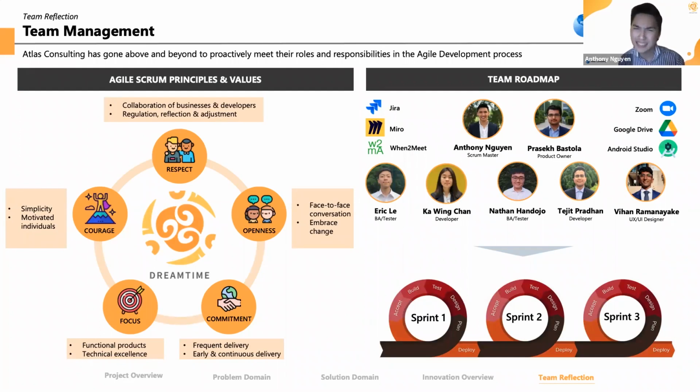During Sprint 1, our team failed to adhere to Scrum practices and often overcommitted to deliverables, leading to scope creep. In response, our Scrum Master and Product Owner demonstrated strong initiative and leadership to run sprint planning and feature prioritization sessions aimed at reducing the projected workload on all team members. This ongoing commitment to agile ways of working meant that we were able to exceed expectations for Dreamtime and add functionalities well beyond our intended vision, including push notifications, chatbot, and geolocation.